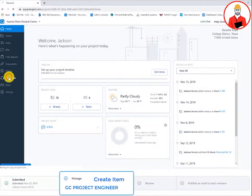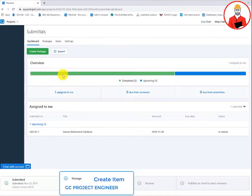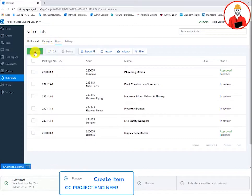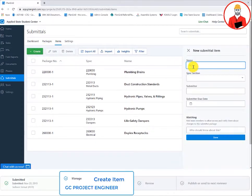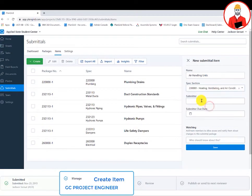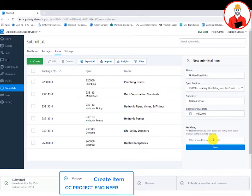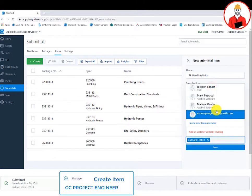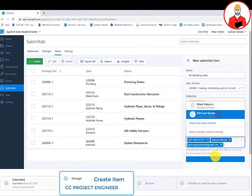The general contractor's project engineer will first create a submittal item. The project engineer selects new item and a dialog box appears on the right side. Here, the project engineer can type in the name of the submittal, the spec section, who will submit the submittal, a due date for that submission, and any relevant parties who need to watch this submittal.